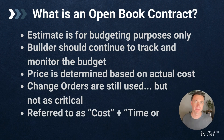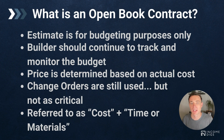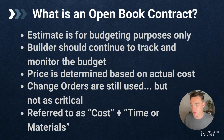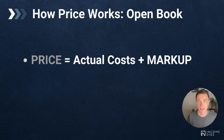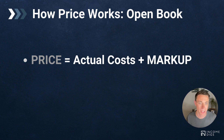Open book contracts are also referred to as cost plus or time and materials projects — they're all pretty much the same. I think 'open book' is a really nice way to describe it because it conveys how transparent these projects are, without getting the customer too focused on the markup. The price of an open book contract is your actual costs plus an agreed-upon markup. Buildertrend now allows us to do that, and I'm going to show you how to set it up within the system.